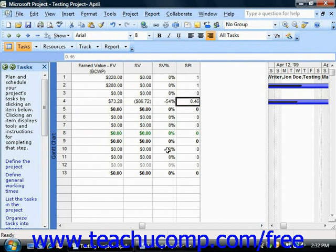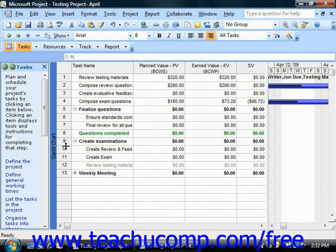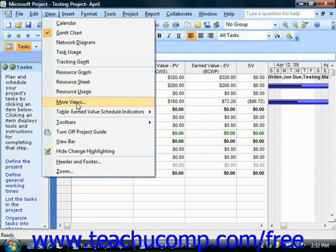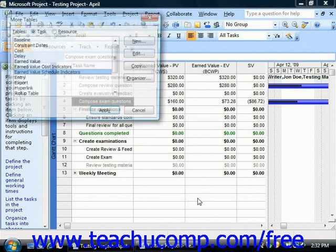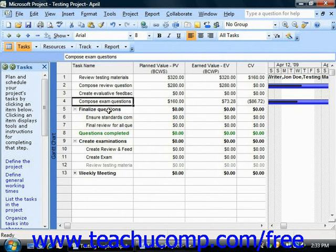You can also view the earned value cost indicators for your project file in the Gantt chart table view. You can switch this view by selecting View from the menu bar, rolling down to Table and then the current table name, and then choosing the More Tables command from the side menu. This time, select Earned Value Cost Indicators from the More Tables dialog box and then click Apply.